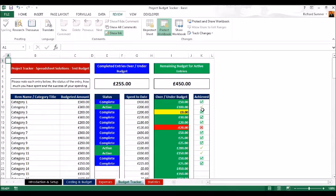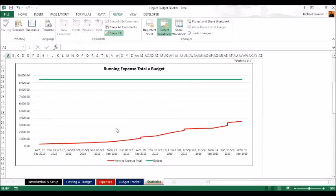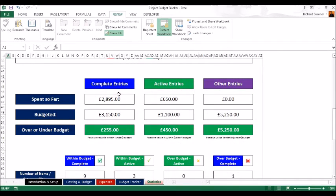We can see at a glance that we've achieved most targets and we're on track with most of them. In the statistics section, you can see the company and project name, total spent so far, total budget, and that we're 37% into the budget. There's a running expense graph that gets more detailed as you enter more purchases — you can see the expense line slowly catching up to the budgeted amount. You also have statistics for complete entries: spent so far, budgeted, and under/over budget amounts.